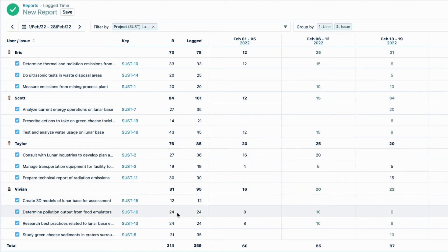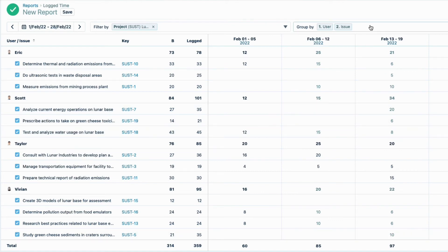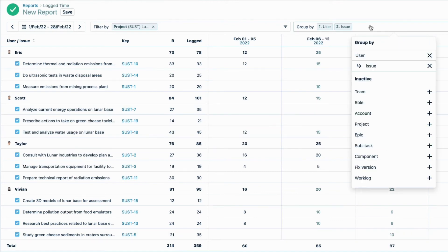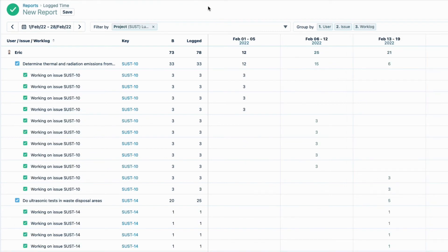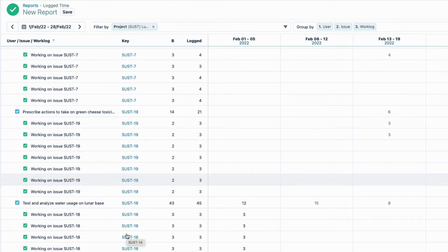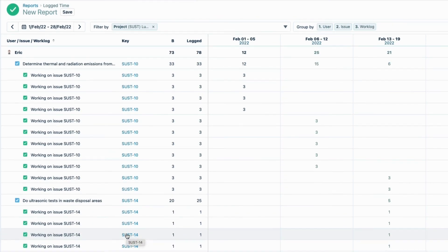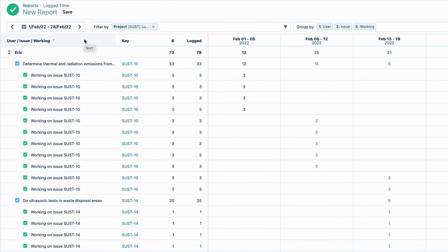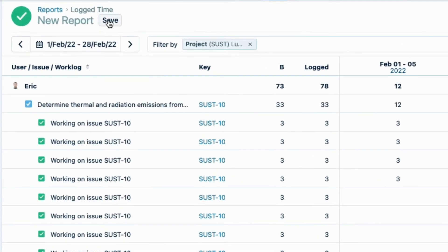And importantly, I can see the total billable hours done by the whole team for this month. There's one more level of detail that I need to include in this report, and I can add that in the Group By field. And that's Work Log. Lunar Industries needs to see each work log, which is an individual time record of the hours logged each day for each Jira issue. And there are a lot of time records.